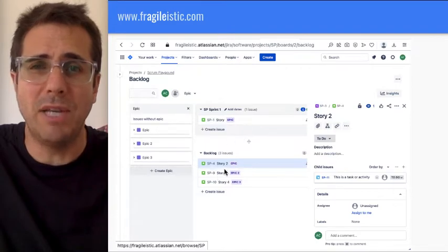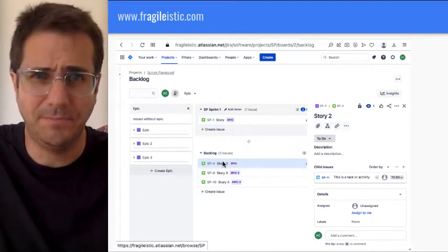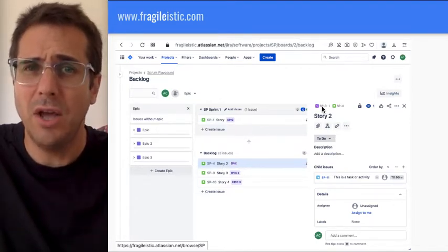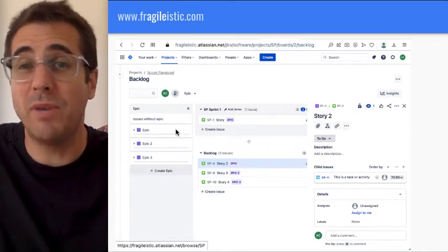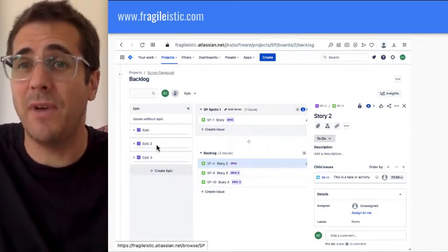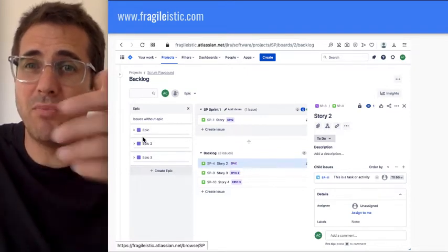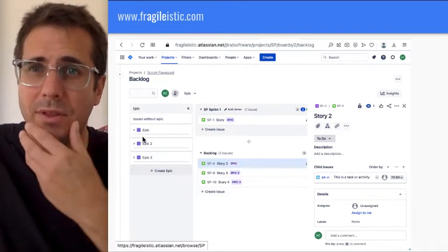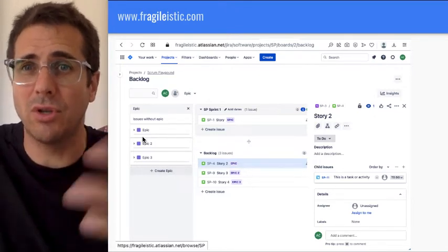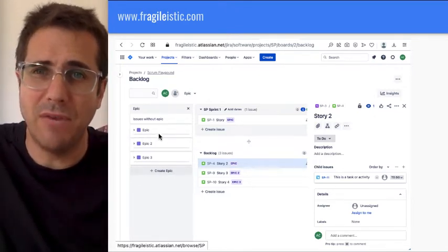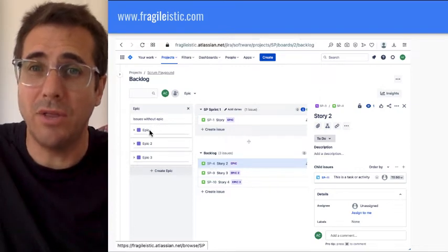But what we'd be doing is we'd be clicking on this story here, and we'd be seeing here, okay, it's part of an epic, part of this. You probably wouldn't even start there. You'd start by creating these epics and refining those. So this is called progressive elaboration. We start with the big things and we break those down. One of the groups I work with is breaking down rocks so we can carry them. So these big rocks over here, these epics, we click on those and start to refine those.